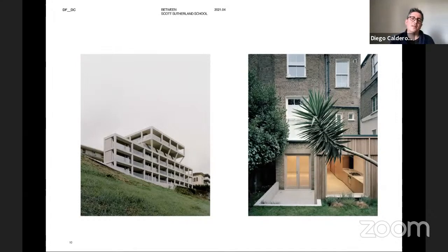So basically, in this building, we said, look, the structure as designed will probably go for between 70 and 100 years. The structure, the bones of the building, it's quite an exoskeletal building, as you can see, should go for this amount of years. Then the services within it, the installations, will probably go for 50 years.